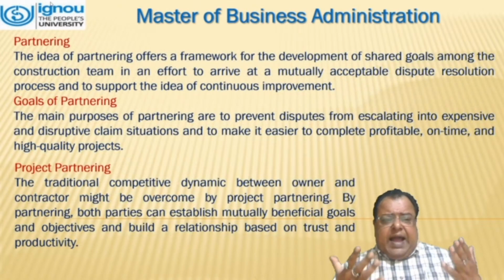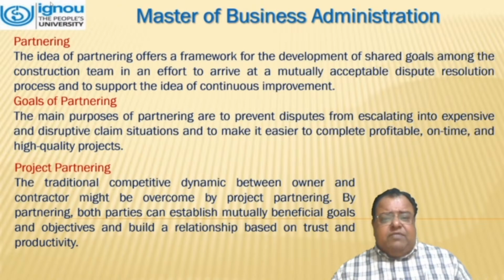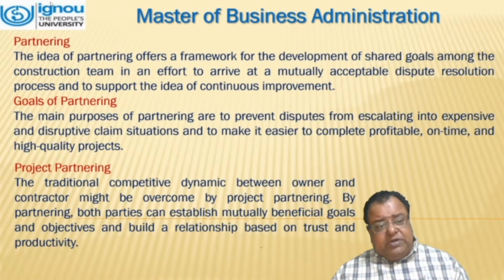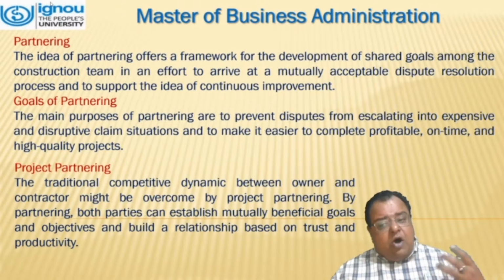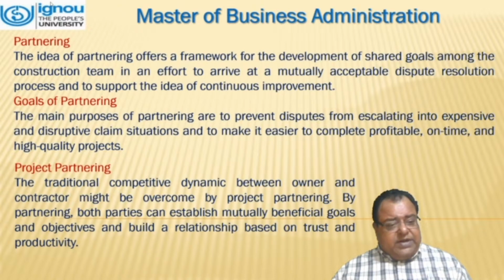Partnering. The idea of partnering offers a framework for the development of shared goals among the construction team in an effort to arrive at a mutually acceptable dispute resolution process, and to support the idea of continuous improvement. Goals of partnering. The main purposes of partnering are to prevent disputes from escalating into expensive and destructive claim situations, and to make it easier to complete projects profitably, on time, and at high quality.